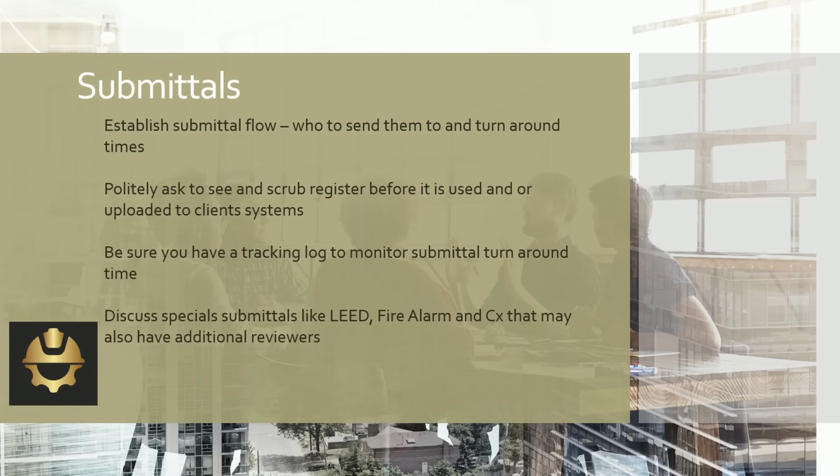The product data sheets were actually just sent as part of the design with the specifications, and then the Corps also needed to be on board, and they committed to reviewing those submittals as part of the design. And what it did was it took a 2-year project down to less than a year. So we saved that much time and that much paper.